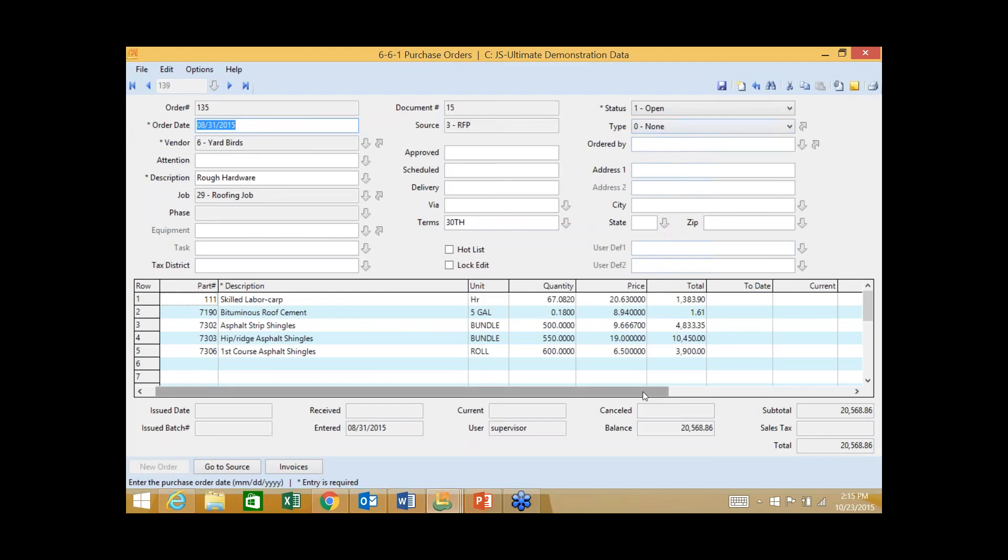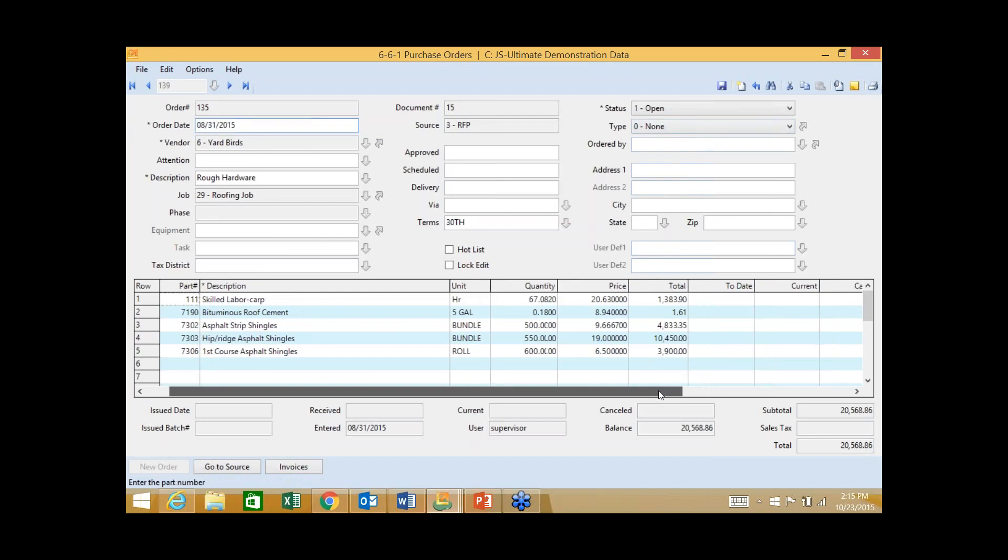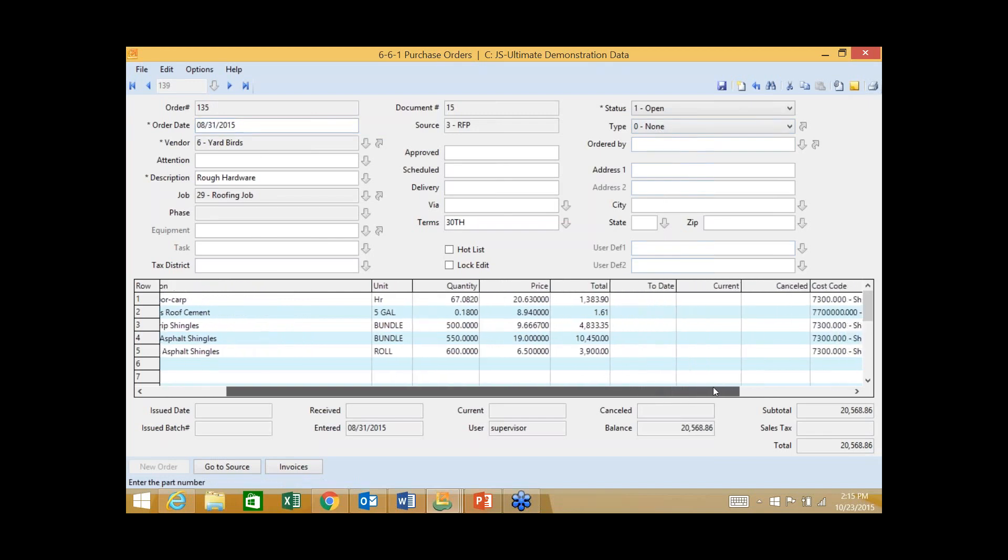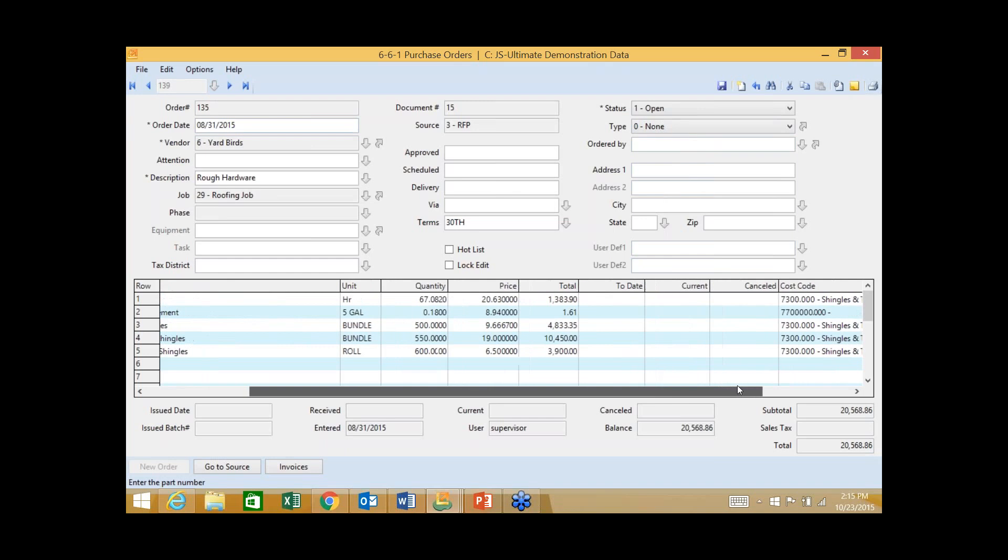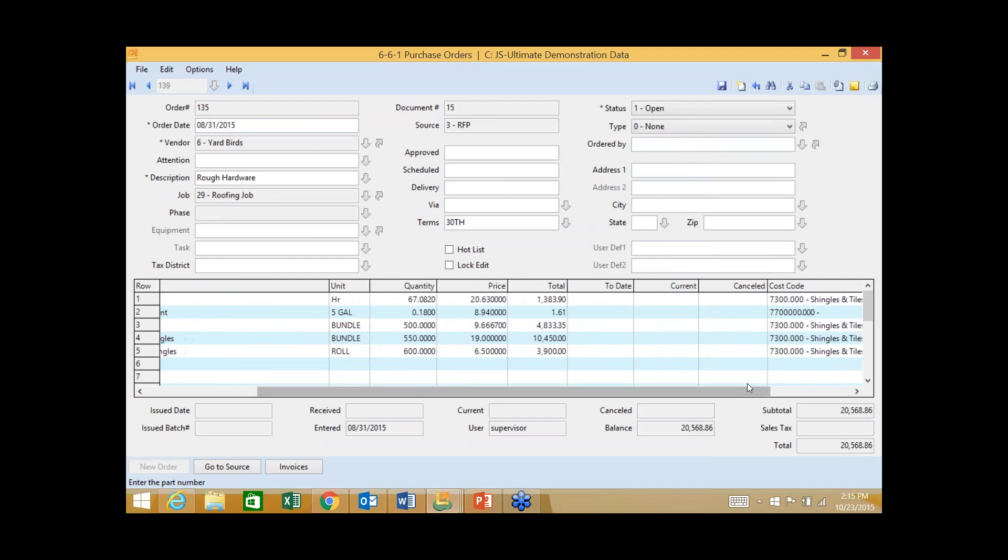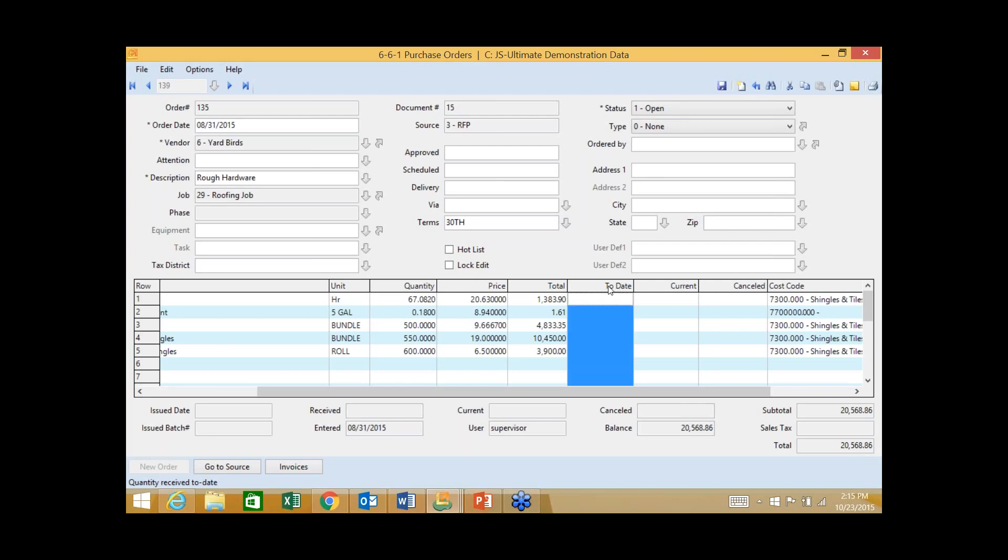If Ashley happened to reply back to that email with a signed purchase order, indicating that she's accepting that PO and will provide and furnish those materials, I could drag and drop that email right onto this particular record. And now that email becomes a permanent part of my record or my system of record. POs fully integrate with a number of different places. We already talked about the job and the vendor, but also with accounts payable as well as inventory. When we enter an AP invoice against this PO, we're basically drawing down against that quantity we've ordered. As those invoices get entered, it will update this to date column here.